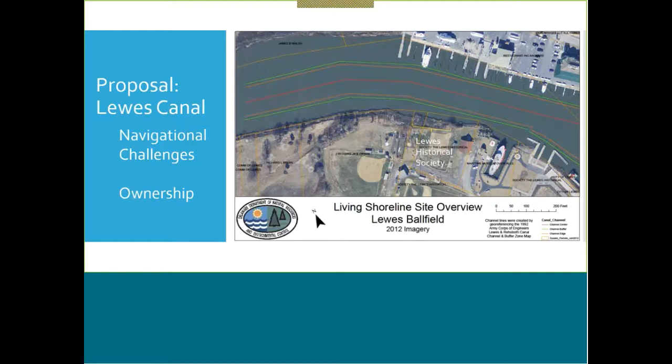The marina on the opposite shoreline is expanding, where you see the mark to the left-hand side. They're actually installing an over 800-foot long floating dock, which is going to house 25 additional vessels. So it's just something to keep in mind when you're designing this particular project, that I would plan for additional boat wake, because this marina is for commercial vessels. Wow. Okay, that's great to know.